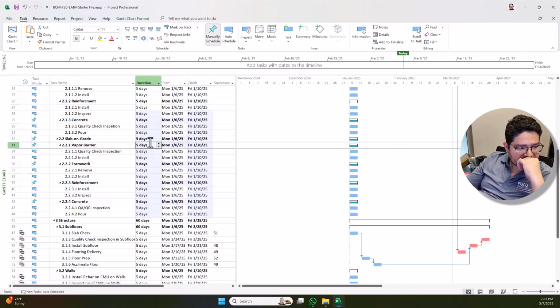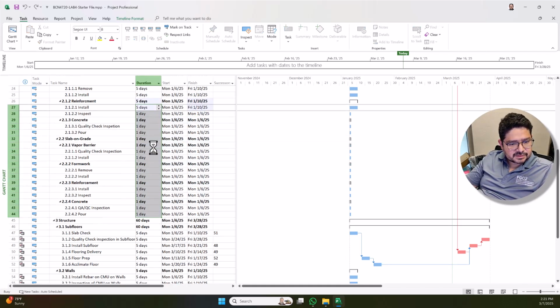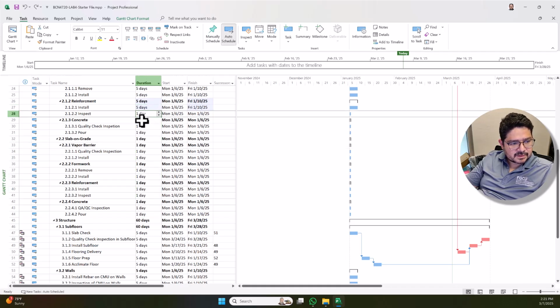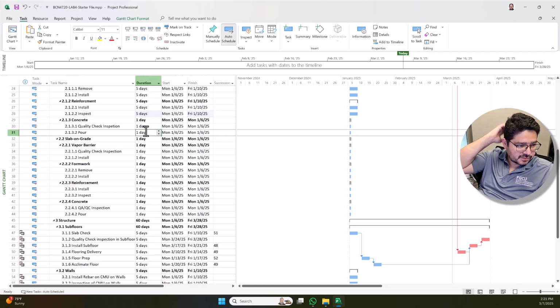The trick is that when you transfer the constraint to the WBS, you're forced into the relationship. So I'm just not gonna do that. It's because if you drag this to a summary activity, then you're constraining that activity to be 5 days, and I think there's gonna be issues with the durations of the activities within.